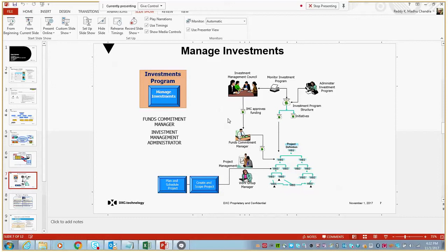The project can purchase all materials required via a WBS element, which can be tagged to a WBS element. PS actually creates an AUC at the point when the project is released. The investment profile inside the budget profile and the program positions tell PS that it is an investment project. And the settlement rules will be created automatically when you create a final asset using the project builder.